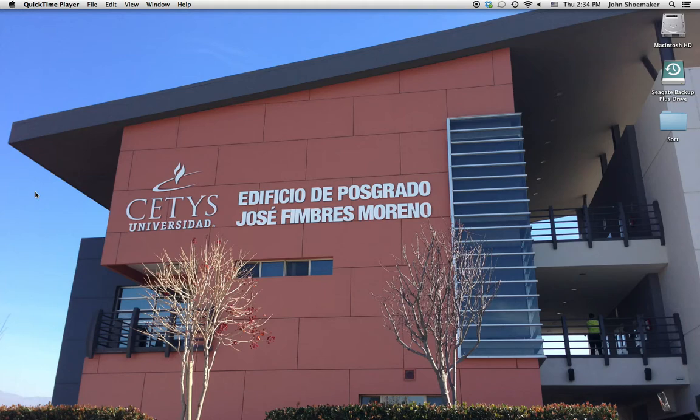That's of course assuming that we have a complete work breakdown structure. If you leave things out of the work breakdown structure, then of course they won't be factored into the total cost of the project and will underestimate the cost.